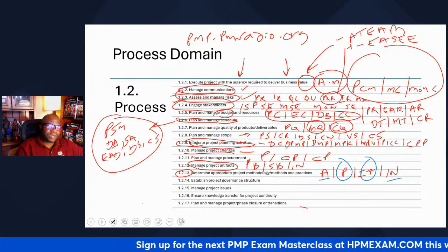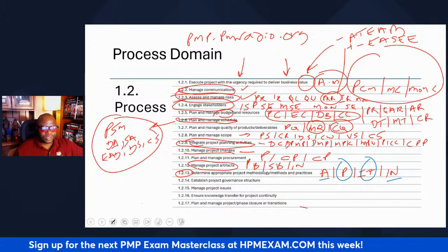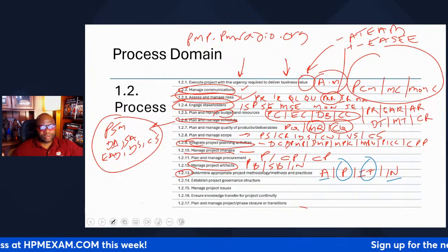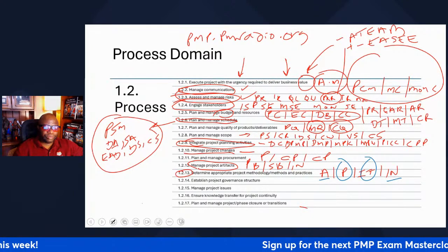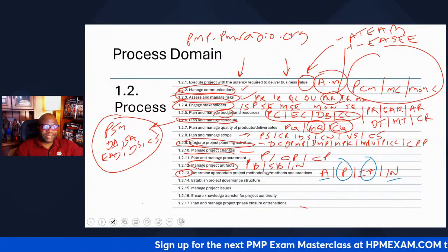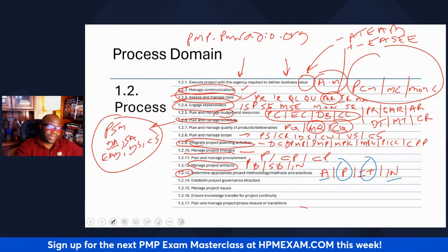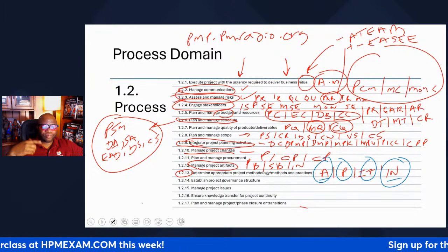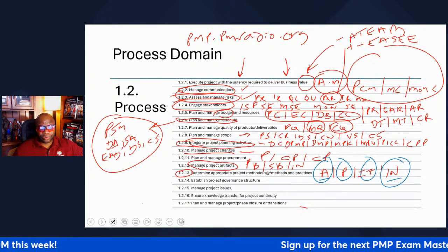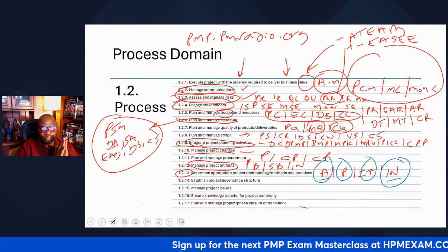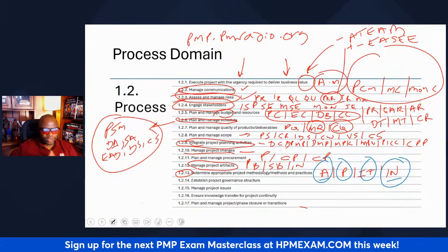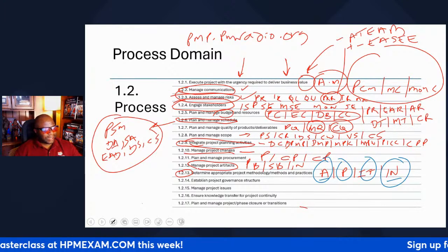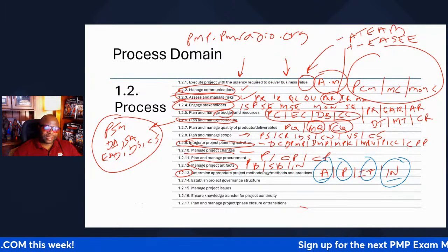Okay. You need to understand when to use an agile approach versus an iterative approach. If you are repeating till correct before you deliver, then agile is not for you. If you are repeating till correct and delivering incrementally, then agile is for you. If you are delivering in small batches and doing it once, not repeating things, incremental is for you. It's used for a well-defined product. You do the work once and out it goes. You deliver in batches. It could be, I want to deliver 10,000 flasks, or I want to deliver 10,000 mice.